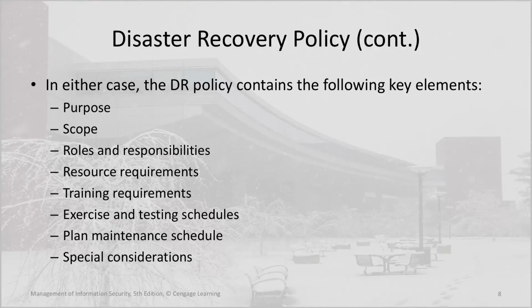In either case, the DR policy contains the following key elements: its purpose, its scope, roles and responsibilities, resource requirements, training requirements, exercise and testing schedules, planned maintenance schedules, and any special considerations.